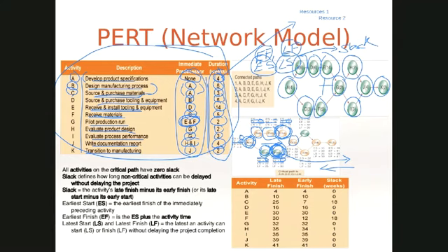Now you can schedule it later on, getting closer to G's timeline, or in this case, to E's timeline, and then say that, well, I'm not going to just get the resources and pay them for 18 weeks for doing nothing. I can either decide to get it done early and leave it there, or get it done later and wait.